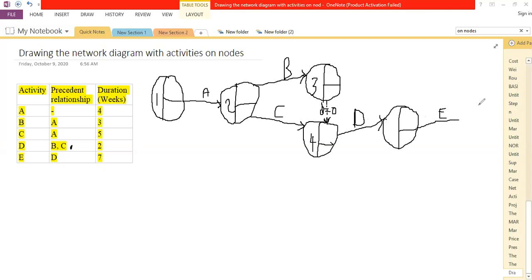Avoid the loops. All the time your arrow should be pointing forward and not backwards. And there we mark the end of our project. Our network is not complete, as you can see. Why? We need to come back and fill in the activities' durations.